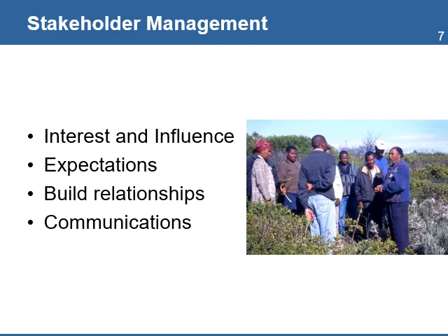The stakeholder management process consists of steps that help determine the levels of stakeholder influence and interest by categorizing stakeholders. It is about understanding the actual versus the perceived expectations and determining the major constraints and tolerance for change. One of the key processes to manage stakeholder expectations and build a strong relationship is through communications. As a project manager, you will need to develop a stakeholder communications plan that identifies the communication needs of stakeholders, the content of the communications, the frequency, and the format.